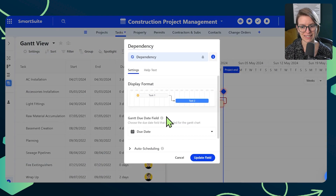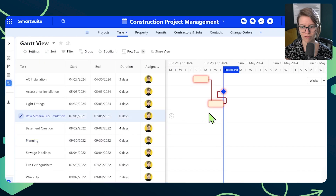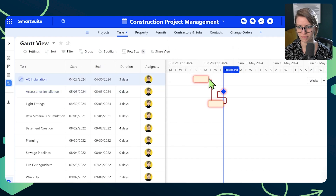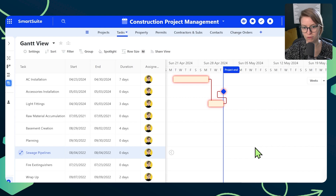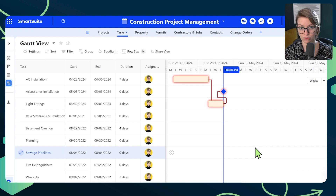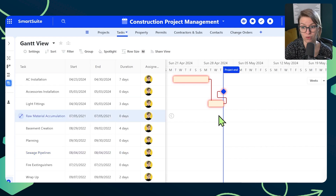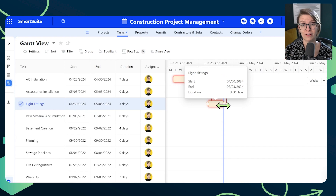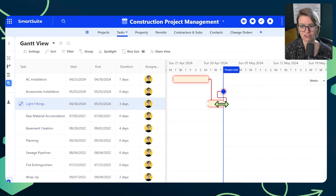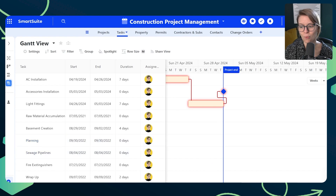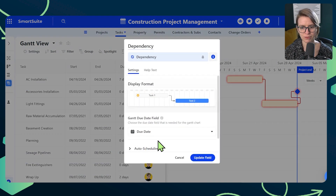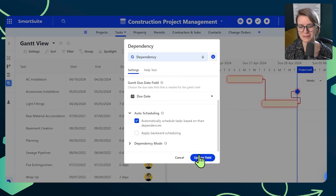Related to auto scheduling, there's backwards scheduling. Essentially what this does is it works off of durations and end dates, and the only thing it changes is the start date. So if a task is running long, SmartSuite is not going to move things backwards — it's going to move things forwards. This feature is one I really like to use when planning out a project from scratch. Maybe you know the project needs to end on April 28th but you don't necessarily know when you have to start. If you add that end date and start filling in tasks with approximate durations, it'll start backfilling the start date so you know when you actually need to begin.